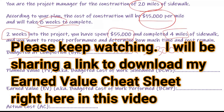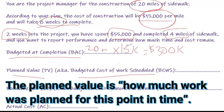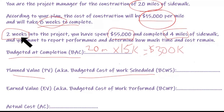The next thing we need to solve is the planned value. The planned value is also known as the budgeted cost of work scheduled (BCWS). This is what you have scheduled — what you think you should have completed by now. We are two weeks into this project, so two weeks out of eight weeks means you should have done a quarter of the work.